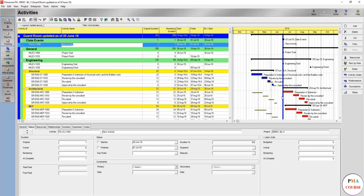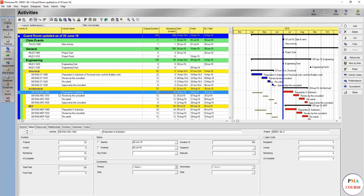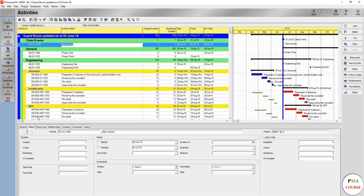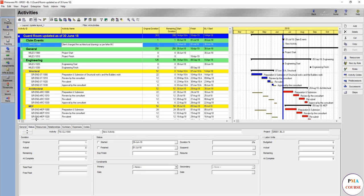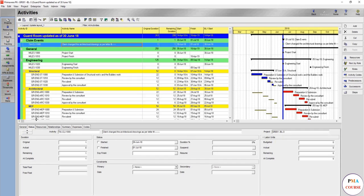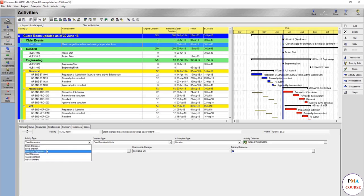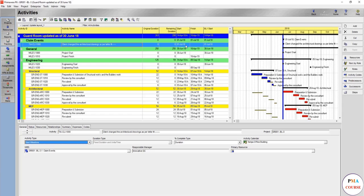Name it TIA dash, let's say, client CLI TIA dash 1000, whatsoever. It's just a hint, remember. And here, for example, the client has issued different drawings, totally different architectural drawings. So we can say the client changed the architectural drawings as per instruction or letter number XXX. You should mention it here as well. And this you might add it as a milestone, let's say start milestone. And this happened on, let's say, 1 July.